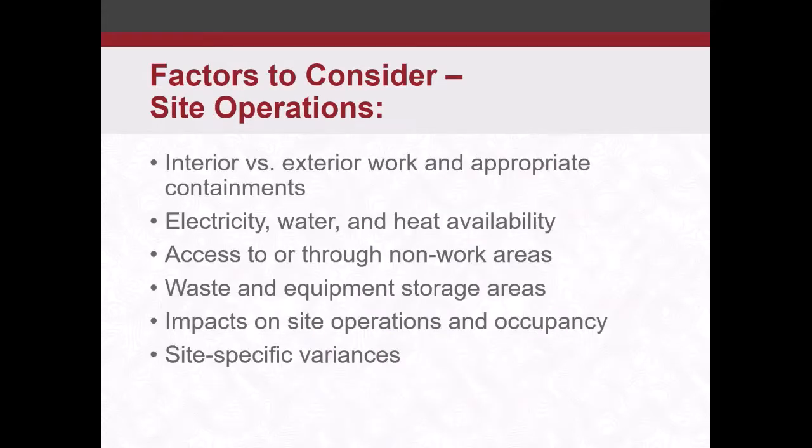Some other factors to consider: site operations, interior and exterior work. You want to make sure you have appropriate containment. What do you have available on site for electricity, water, and heat? Does the contractor have to provide that? That affects the timing of your work. If a contractor does have to provide water and heat, it's better to do that type of project in the summer than the winter, for obvious reasons. So that might factor into your schedule.